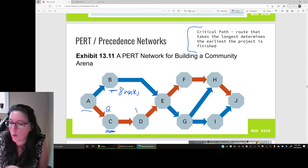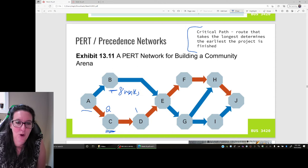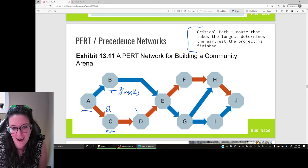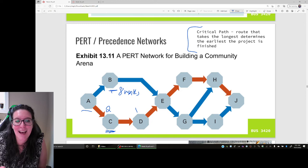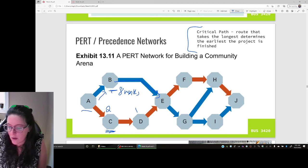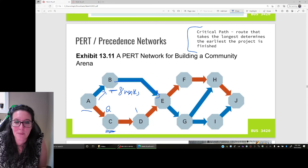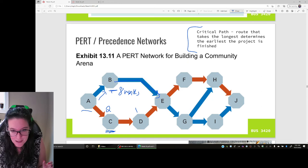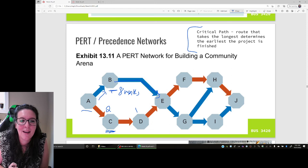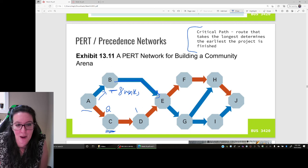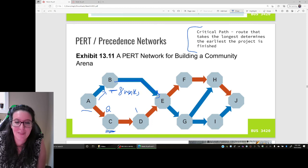We find what is called a critical path. The critical path tells us the earliest we can finish this project, and it is the route that takes the longest time. Because we still have to do everything to finish the project, it's that longer route that slows us down. Activity B takes eight months while C and D take two and one months respectively. So activity B is part of the critical path because that part takes the longest — we can do C and D while waiting for B, but we have to get all the way through the eight-month activity B.